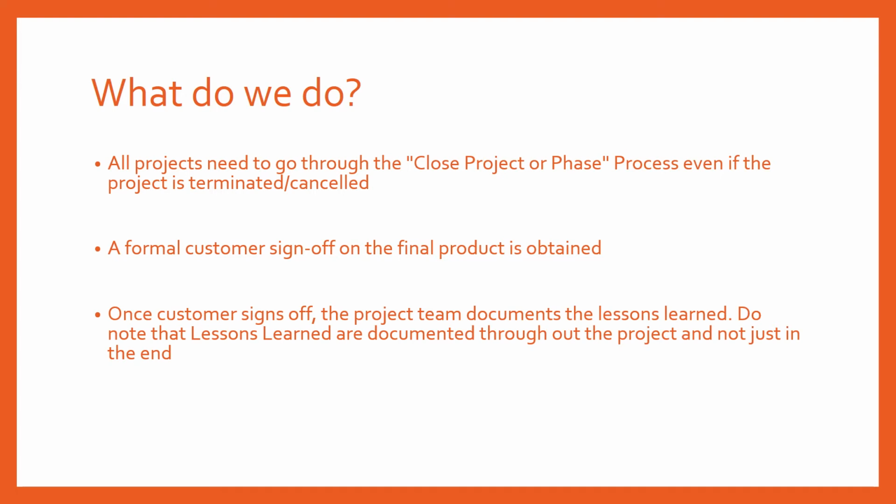Then your project team, not just you, right? It's not just the project manager who completes the lessons learned, it's the entire project team. So once you receive the sign off, that's when the project team starts and completes the documentation of the lessons learned. One thing to note here is that lessons learned is documented throughout the project, right?